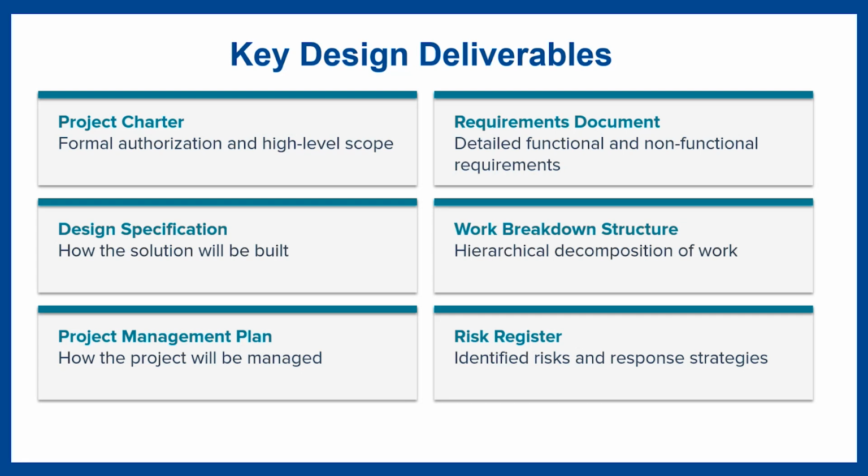Project charter. The project charter is the official starting document, which provides the project purpose, objective, high-level scope, key stakeholders, and initial constraints. The reason for having this document is that it authorizes the project and gives the project manager or project team the authority to use the resources and begin planning.